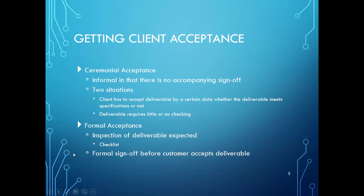In the formal approach, there will be an inspection with a detailed checklist followed by a formal sign-off before the customer accepts the deliverables. It could take place in a meeting or a formal reception where all documents are signed off and the final payment is made for the project.